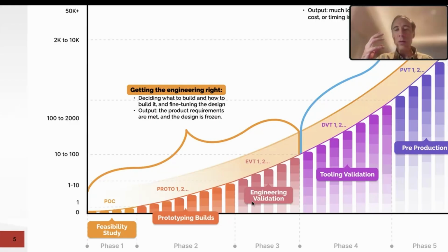And that's where, by that point, a lot of the requirements in the product requirement document, remember that from the very beginning, need to be met. So there needs to be a sort of checklist of where it meets the requirement and to what extent, maybe not 100%, but good engineering teams try to set numerical targets here. And maybe design reviews, maybe a design for manufacturing and assembly review and adjustments. All of this is obviously very good.